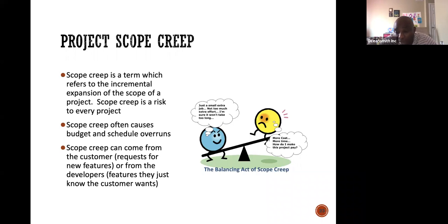And every requirement that you are documenting, you will get signed off from all the stakeholders, from the customer requirement owners. So if you document a requirement, and they tell you, okay, I want this end client to be able to download something from the website, they should have access. Are you sure this is what you want? If they say yes, then they sign on that requirement and you put a date and the name of the person that signed it off. So tomorrow, the person will not come back and tell you that, no, this is not what I told you.